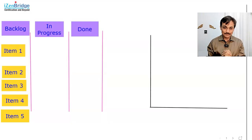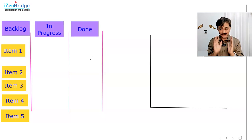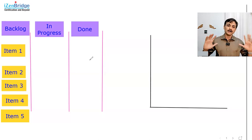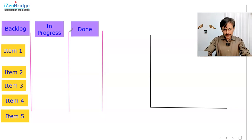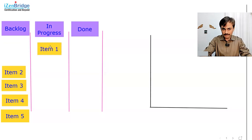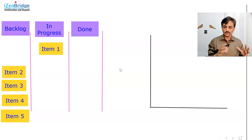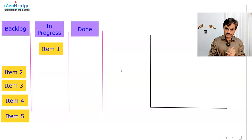Especially when working in Kanban mode. So I use my whiteboard and give you a basic, super basic Kanban board — backlog, in progress, and done — equivalent to your Jira board, assuming you have these three statuses. At the beginning, day zero, I'm starting with five backlog items. During day one, I picked up item one and moved it into the in progress stage. When I finish my day, I started with five items and have one item moved into the in progress stage.